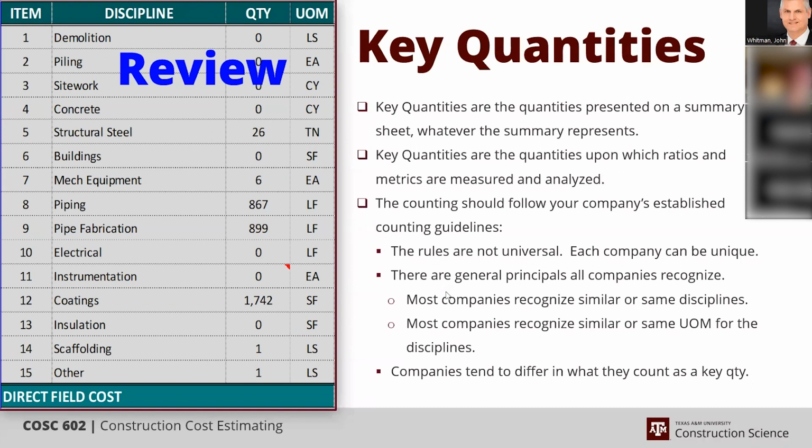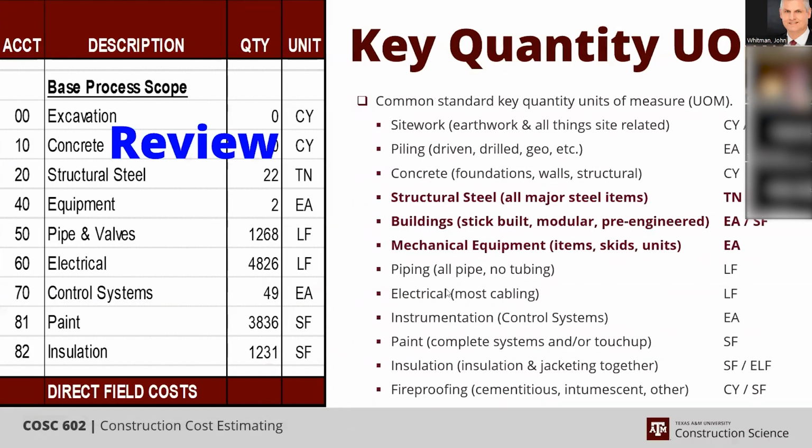So if your key quantity is lineal foot, then feel free to use lineal foot period or feet or lump sum or lot or each or something other than lineal foot, so that the lineal foot items will accumulate. Everything else will be accounted for in your hours and in your material dollars and in your labor and subcontracts, but it won't drive that key quantity. So it will maintain your metrics and your measurements for analysis in the future. Again, today we're going to focus on structural steel, buildings, and equipment.